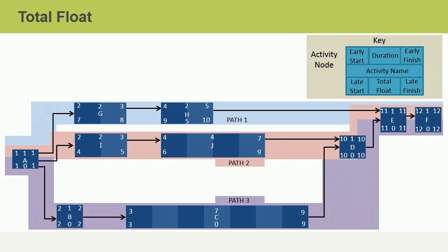If this was your answer, great job! All of these activities have identical early start and early finish and late finish dates. This means that they have no flexibility on when they can start or finish. They are essentially locked in place.